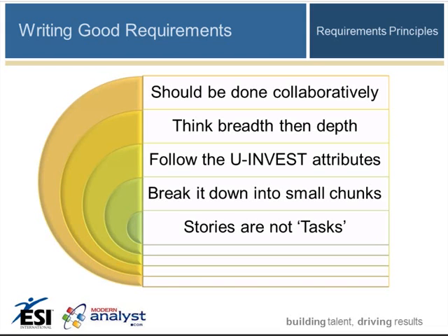The role of the BA previously was something of a specialist who worked as a facilitator to gather requirements from the business users and others. This role is actually filled now by a team. If a requirement can be defined at a high level, it can then be shaved down or broken up into smaller bits if it's too broad a reach. But the key is to start with breadth rather than depth. You can imagine the difficulties if it were to be done the other way around.